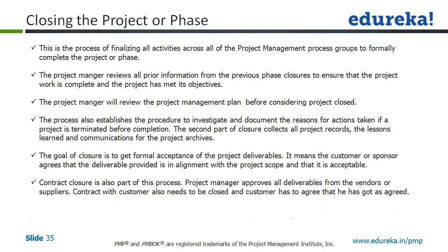We record the major activities, and we collect all the documents pertaining to the project for the records perspective and from the lessons learned perspective. This can be used for any similar project going forward, like we might have used it for the project which we are executing. And this becomes part of the organization process asset.